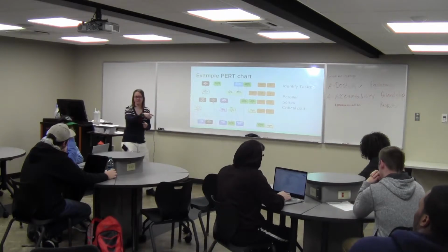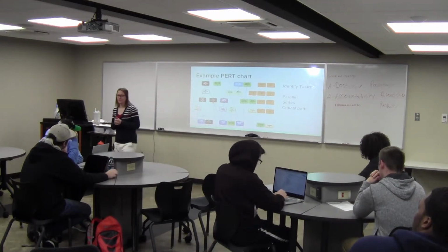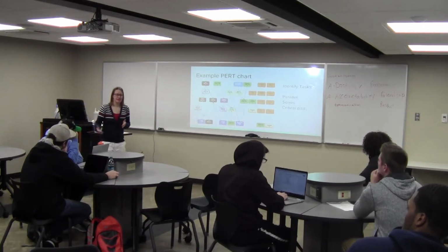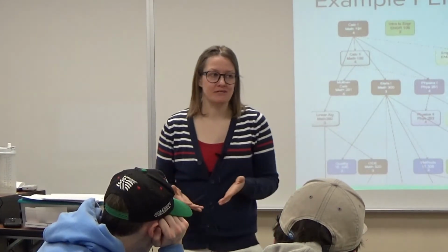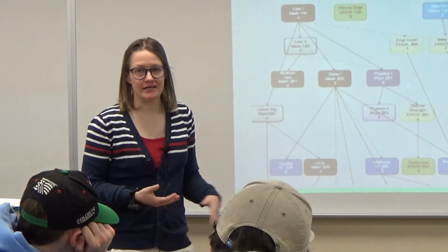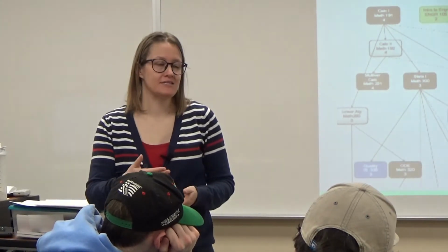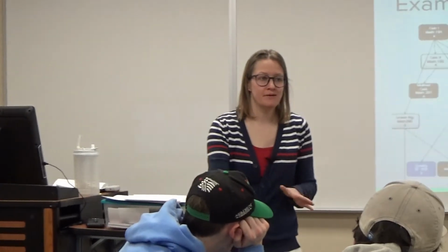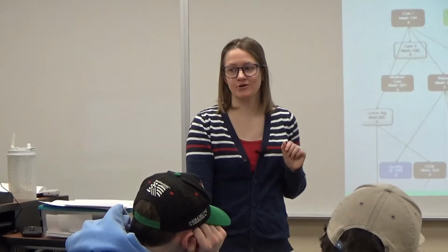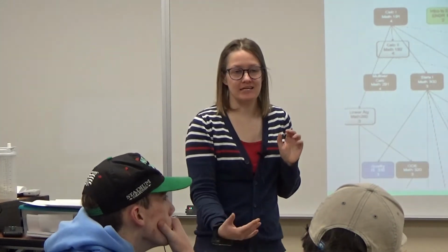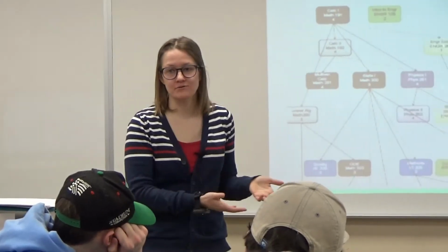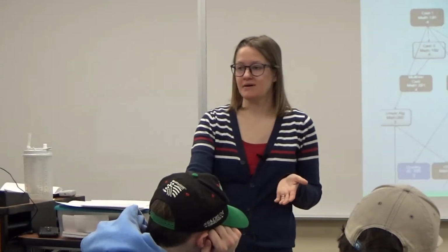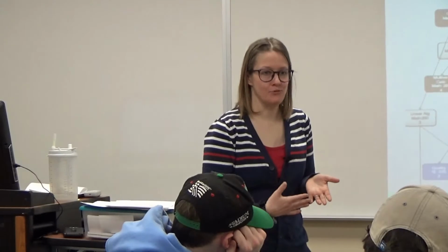Somebody's got to remember. Warren? Yes. So the one that is going to hold you up, right? It's the one that if you don't stay on top of things, it means your whole project is going to be delayed. So in the case of graduating, if you have to take this math class, to take this engineering class, and that series takes the longest, the minimum number of semesters that you have to be here to graduate, that's your critical path. And if by chance you can't take or don't take a class some semester, that's going to delay your graduation by a whole semester, right? Because you have to then wait and move everything back.